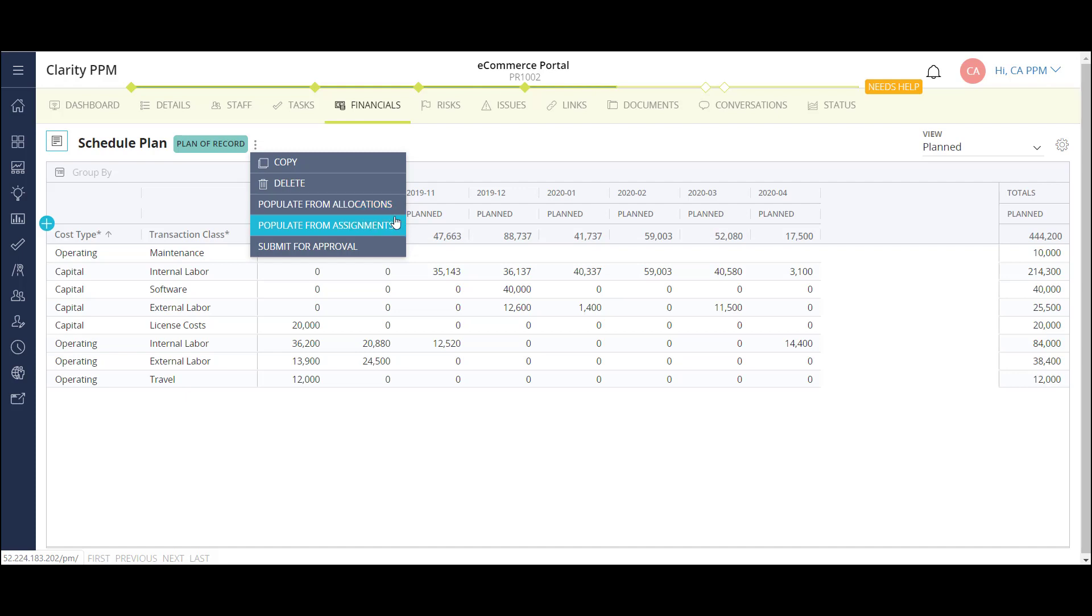Finally, I can populate the grid using my resource assignments on this project. This option will take the ETCs from the tasks the resources are assigned to, and populate the grid based on their rates in the back end of the solution. Once my project schedule is well defined, I can use this option to create a very detailed forecast of my planned costs.